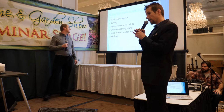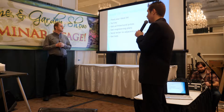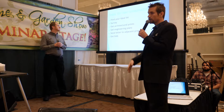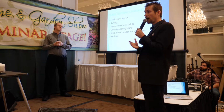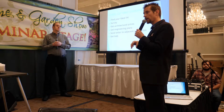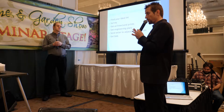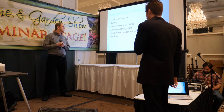And the survey you're going to get, again, is not a normal survey. Obviously, your architect should know the right type of survey to get. Again, you need the setbacks, two houses to the left, two houses to the right. The normal survey that you get when you buy a house in a normal real estate transaction will not work. So especially if there's a house already located on the lot you're going to knock down, don't just get the normal survey. If you're buying a property with the house on it, make sure that you communicate with the seller, so that way you might even have the seller contribute to the cost of that survey.